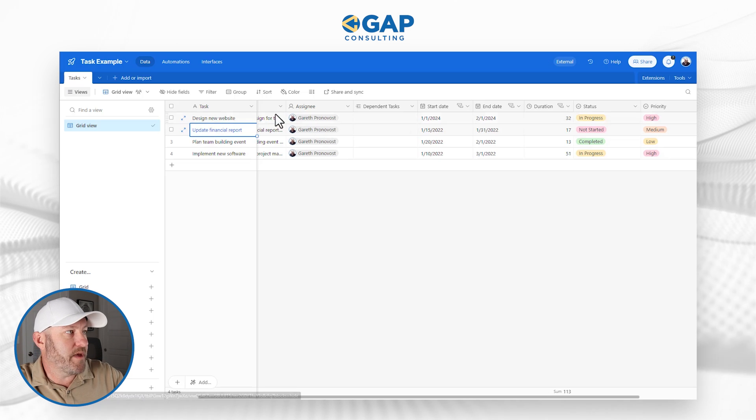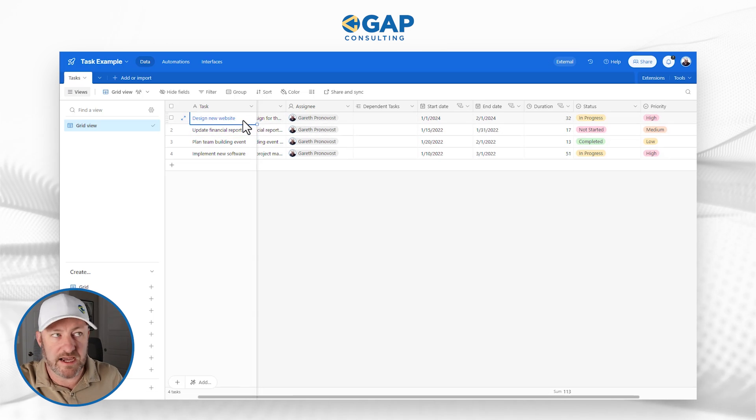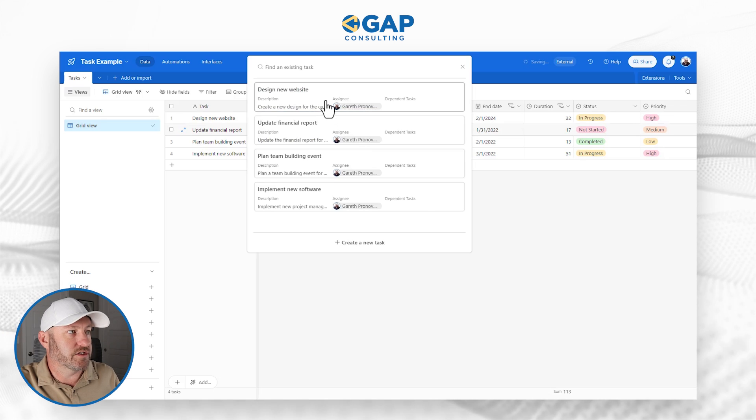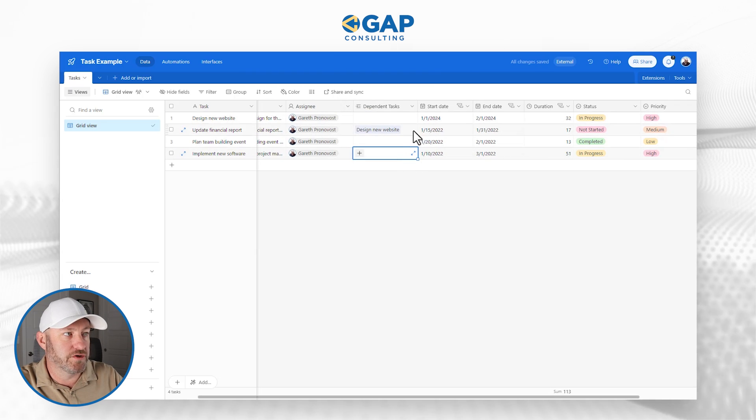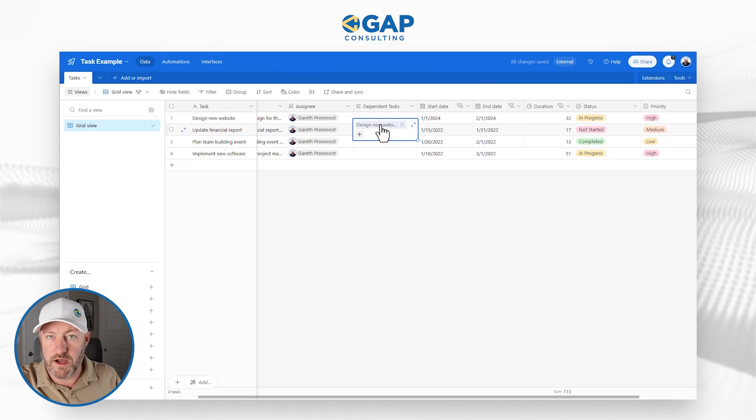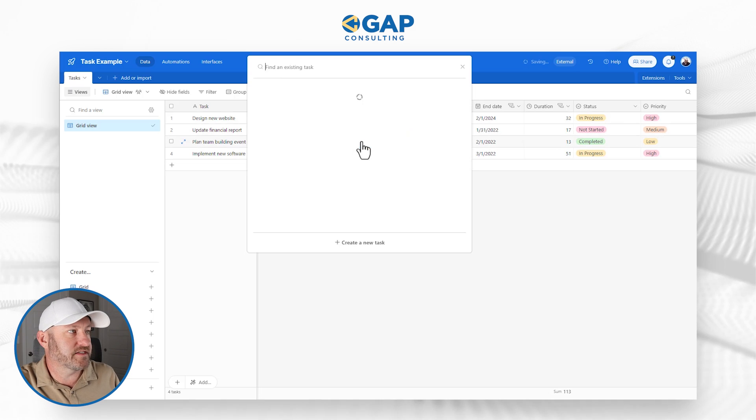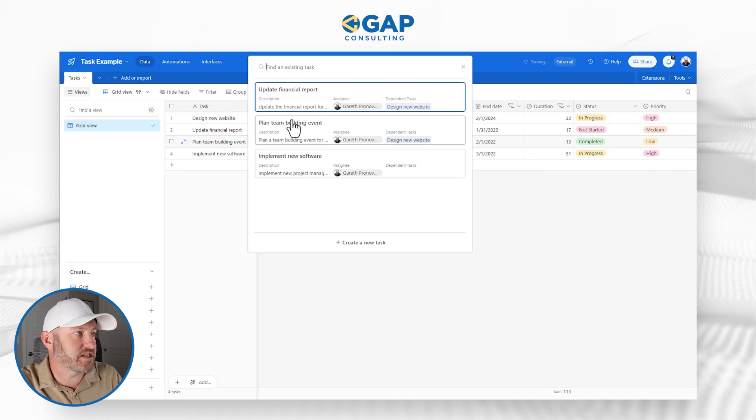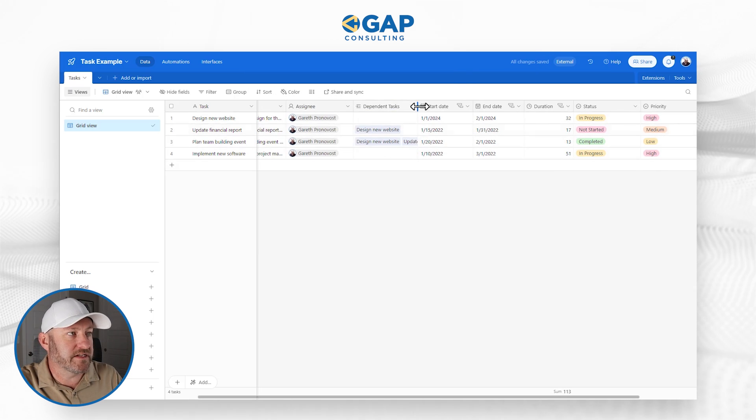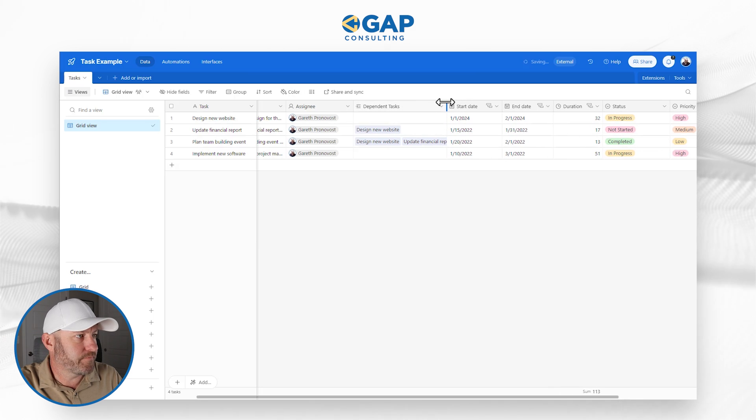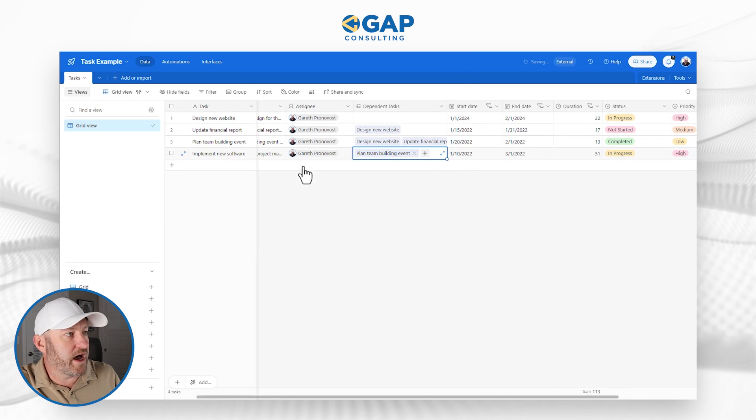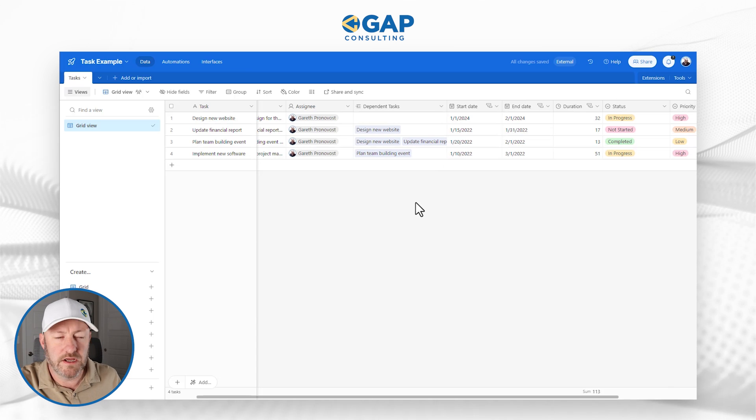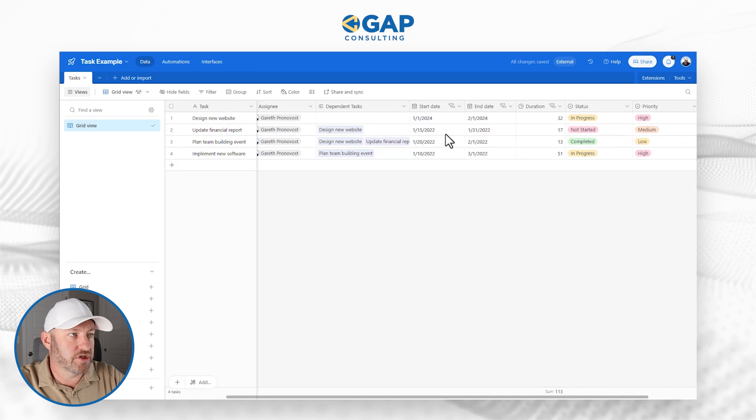Now what I can do is come in and assign dependent tasks. So before I can complete my updating of the financial report, maybe I have to wait for this design new website to be completed. So I can make that selection. This task, task two depends on task one. Next, I might assign task one and task two here to be dependent for task three. And task four down here might rely on task three being completed.